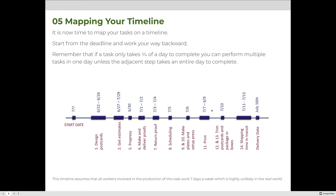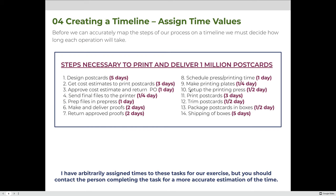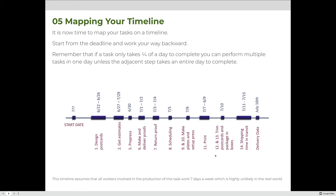Scheduling takes an entire day — July 5th. Making and delivering proofs takes two days each, so proofs are July 3rd and 4th, and delivering them back is July 1st and 2nd. Pre-press was one full day — June 30th. Sending the final files takes a quarter day. Getting cost estimates takes three days — June 27th, 28th, and 29th.